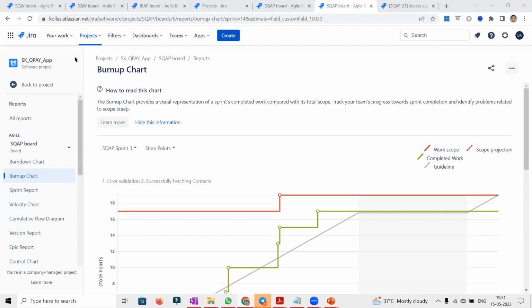I might have added 16 hours as the original time estimate, but once I started working, I realized I might need some more effort from my side to complete it. Let it reflect in the time logging, the actual time spent, not in the original estimate.